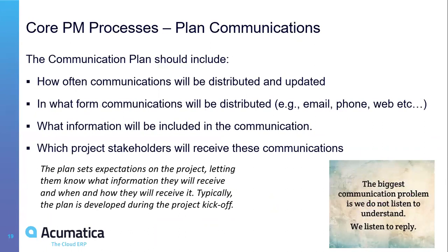It's the communication plan. So you should put a plan together, again, together with the project manager of the customer, what kind of project communication you want to have, and how often you want to do this, how you want to do this. Are these meetings? Is this by email distribution? Is this maybe a SharePoint site, or OneDrive, that you want to utilize for sharing the documents and distributing them? Or are these conference calls? I did a lot of global projects where meetings were just impossible. So there we agreed most of the time a weekly conference call where we discussed everything that is going on in the project with the main resources that are involved in the project itself.